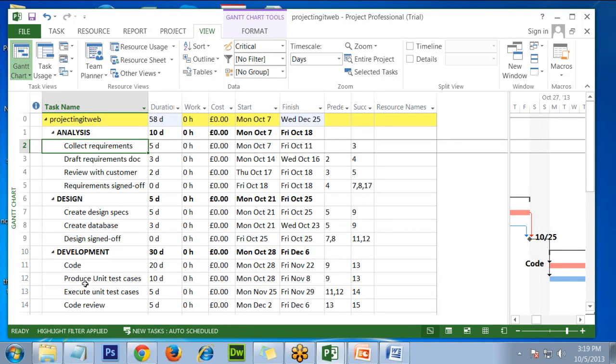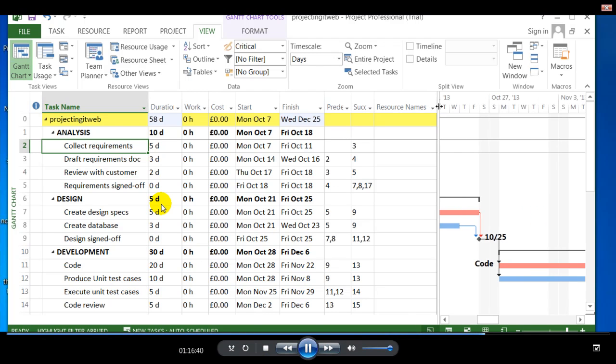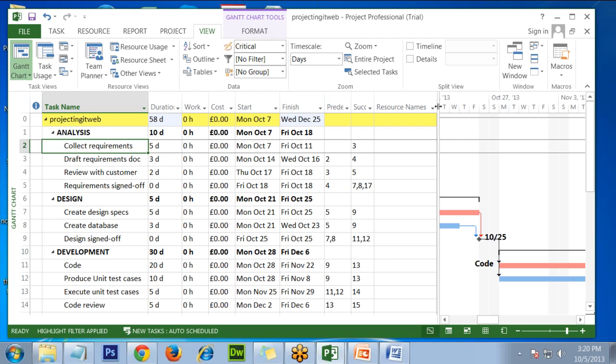The other option is if your resources come from different projects, then instead of creating them in your project file every time, you might create a resource pool and use resources from the resource pool. That way over allocation of resources can be avoided and some central management can be done for controlling resource assignments. Okay, but because that is out of scope, we are discussing resources within your project file.